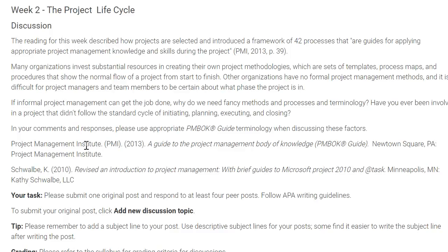They had broken out those 500 activities that had to happen for a new product, from the time it was conceived of until it was introduced, into 10 separate phases. And that was their methodology. Whether it was a little project, a little product, or a big product being developed, every product still had to go through these same steps in the project life cycle. And at any point during that, they could kill the project because it failed in any phase of that project.